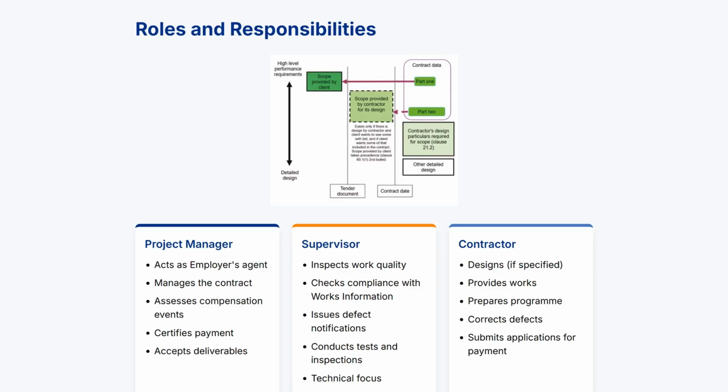The supervisor focuses on technical compliance and quality assurance. They inspect the works, check compliance with specifications, issue defect notifications, and conduct tests. While they report to the employer, their role is separate from the project manager to maintain independent quality oversight.